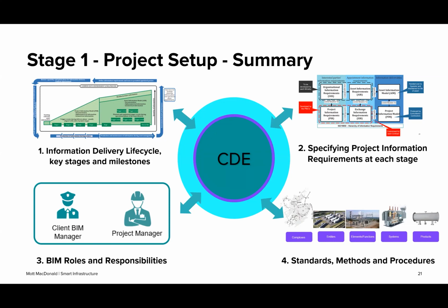And finally, the thing that needs considering and setting up is the common data environment. So this is the area where all information will be kept and stored. It'll be produced and shared between all parties. And this isn't just installing a piece of software that can do this job. This is actually configuring that software to allow all the decisions and transfer of information to occur. So it does take time to create, develop, and make sure it works and is tested.